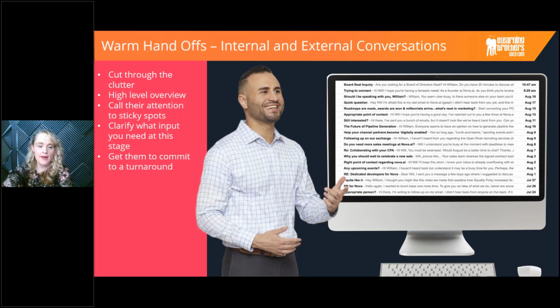Yeah, so scope creep is always, I shouldn't say it's always going to be a thing, but it's always a risk, right? And so it's to have those conversations early and often, and just lay it out there and give the stakeholders the opportunity to make that decision, right? Present all of the options to them so that they can make an informed decision. So we can move forward with the project the way it is, and we keep this particular scope creep item out, and maybe we put that in the next iteration, or do we delay the launch of the project so that we can get them in, or C, do we just scrap it altogether?